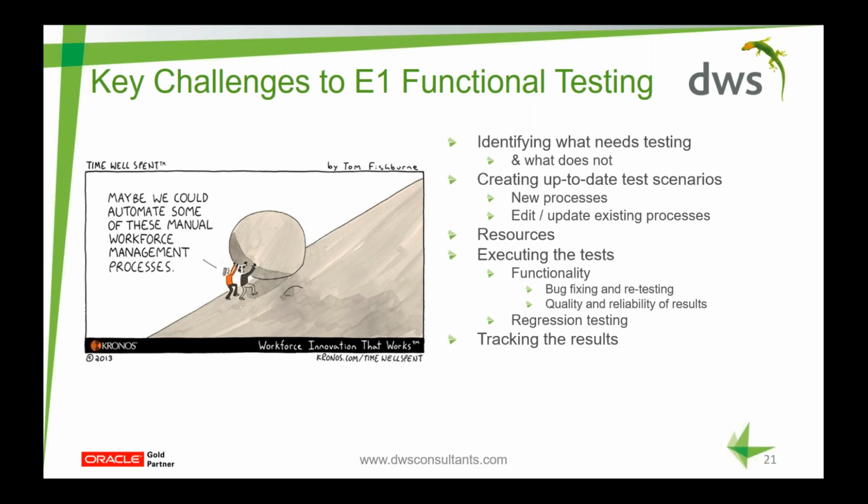With the sheer volume of potential testing that may be required, with subsequent cycles of fixes and retesting, it is important to keep accurate track of what has been tested satisfactorily and what still requires final testing. And this brings me to the classic issue of agile versus waterfall testing. In the waterfall testing model, no testing is started until all development activity is completed, so no usable software is produced until very late in the whole upgrade process.